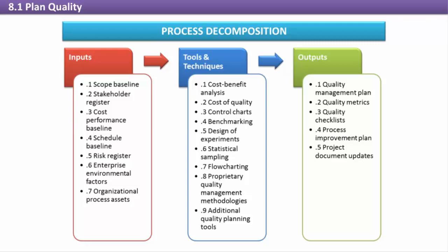Quality checklists are documents that outline the key steps that must be performed as part of quality control. Checklists are to-do lists that ensure that everything is performed and in the correct order. The quality checklists that will be used later during the quality control process are developed here.